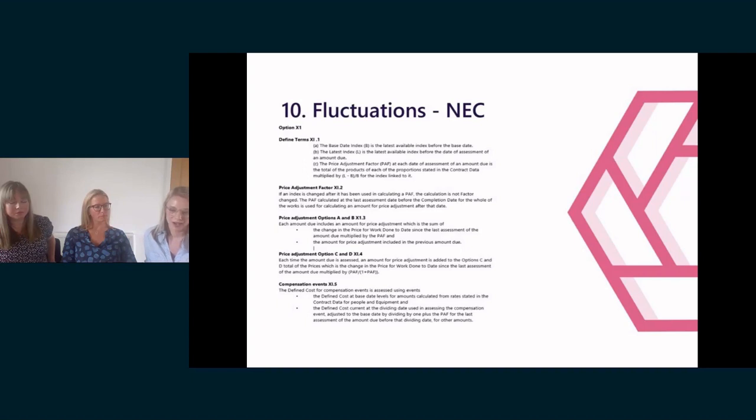The issue contractually is that often the main contract sets out the various different levels of PI. And again, I know I've sounded a bit like a broken record, but it comes down from the funding agreement. The funder says, we want all of your supply chain to hold 5 million PI cover on an each and every claim basis. That gets written into the main contract.